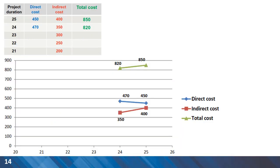Also we can plot project duration and cost. As you can see the total cost is going down so it is making good sense to continue crashing.